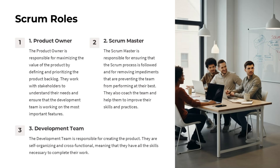The Scrum roles are critical to the success of any Scrum team. The product owner is responsible for defining and prioritizing the product backlog to maximize value, working closely with stakeholders to understand their needs. The Scrum master ensures the Scrum process is followed and removes impediments to team performance, coaching the team to continuously improve. The development team is self-organizing and cross-functional, with all the skills needed to create the product.